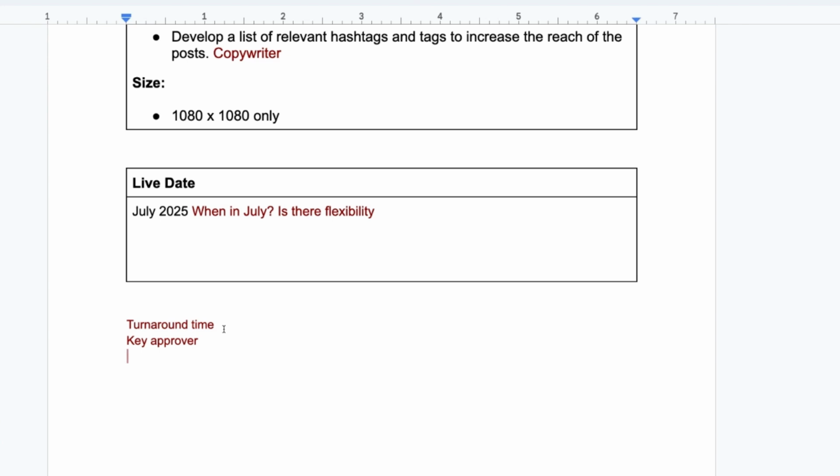Is it 2 people? If it's more than one person, then it's really important that they consolidate their feedback rather than giving feedback in drips and drabs, with different people having different opinions. It's really challenging when you get feedback like that, because some of the feedback might contradict each other and the designer isn't going to know what information he should be focusing on the most.